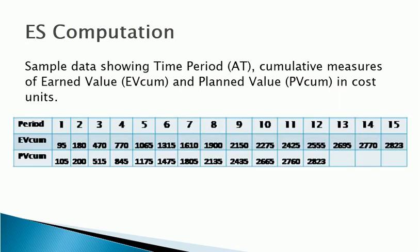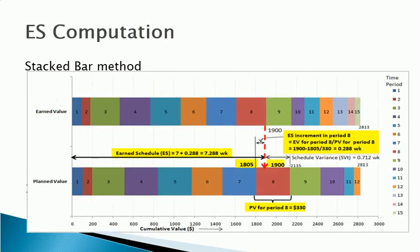To understand how to calculate Earned Schedule, let's look at the sample data shown in the table. As discussed before, Earned Schedule can be computed graphically by projecting EV at the status period onto the PV curve and then taking the X-intercept of this projection. The actual ES computation formula uses linear interpolation, so to make the graphical process more intuitive and accurate, we can plot the EV and PV data on a stacked bar diagram.